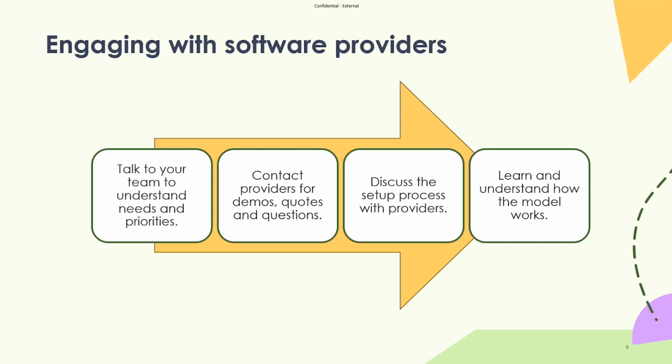Discuss the setup process, because although it seems really great having that software system in place, if you're working towards a deadline, you need to know what that setup process looks like, not just how long it takes, but who else in your team will have to be involved in helping get it set up. So if you've got current data analysts across your team, how much time are they going to have to put forward in sending across the data? And not just the short term of getting things set up, but eventually the long-term data governance process of who's going to be responsible for the uploads, who's going to be responsible for reviewing it, and how often and frequently that gets reviewed and managed.